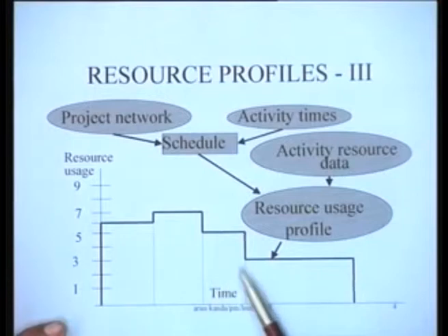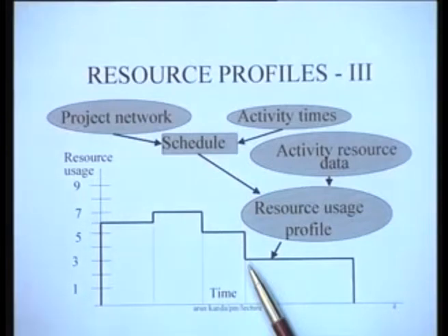This information is vital to the planner, to the project manager, because it would help him to identify exactly what is going to be the resource requirement for the particular project. And moreover, if you are interested in hiring and firing manpower, you know exactly from this information how much manpower is required during what particular periods of time. So you have to make your provisions for hiring and firing appropriately.